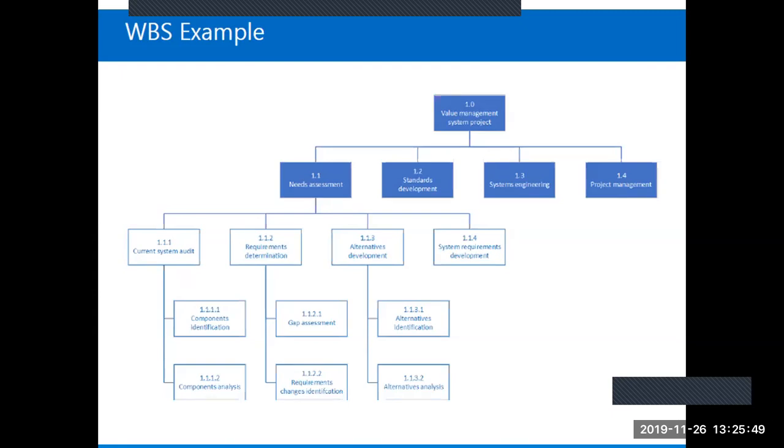Okay, so you should take note, the work package is the lowest level in the work breakdown structure. Then you have control account, which is above the planning package. Okay, the planning package is in between the work package and the control account. The control account is a management account, an inspection point, for example, where performance measurements could be taken, where details and track records of performance of the project can be obtained. So it's a control account. One control account can serve many work packages below it.